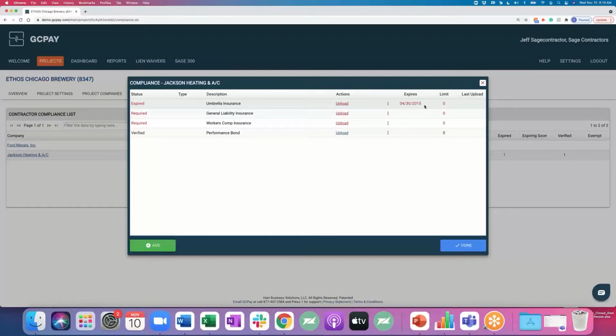Next thing is your subcontractor can upload their updated insurance directly into the system. So again, no more back and forth emailing, anything like that. Your team gets to actually have eyes on it and approve it before you just let it happen. Your team gets full approval. And then right in the system, you can even hold payment automatically unless a compliance term is met. So it fully automates the compliance feature.